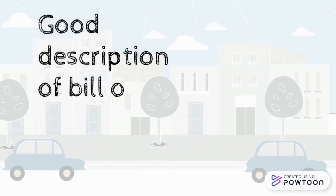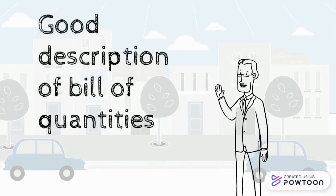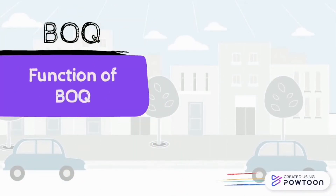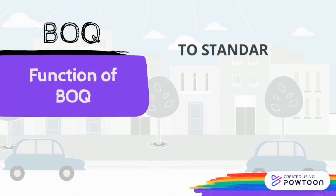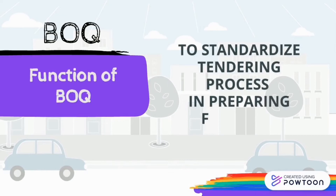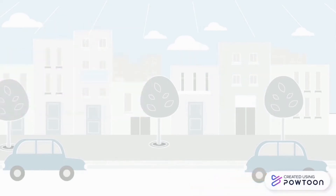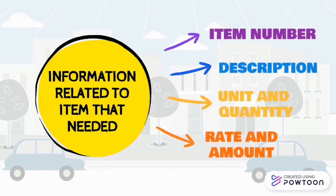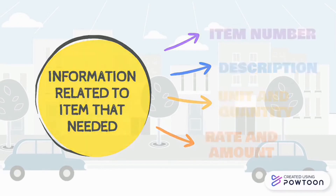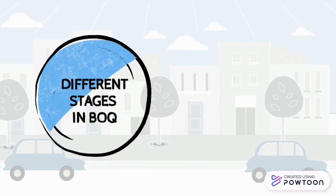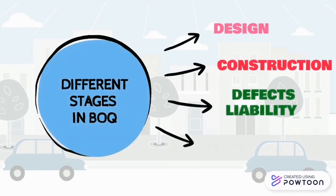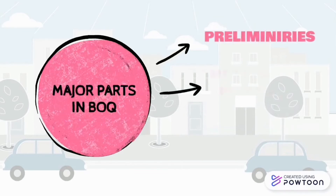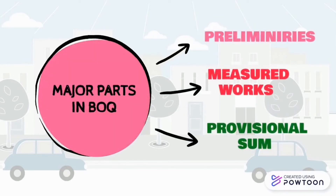A good description of billed quantities: the function of a Bill of Quantities (BOQ) is to standardize the tendering process in preparing firm cost. The information related to each item includes item number, description, unit and quantity, and rate and amount. The different stages in BOQ are design, construction, defects liability, and operation and maintenance. The major parts in BOQ are preliminaries, measured works, and provisional sum.